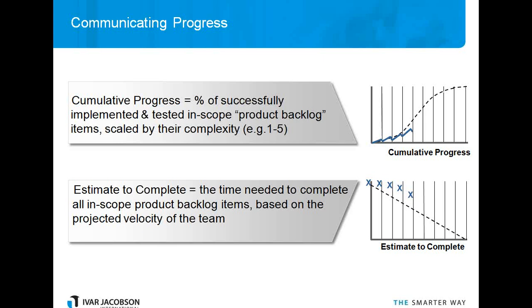The dashed line represents the expected progress on the project. And the curve starts off slowly as you deal with difficult issues, and then ramps up, gets relatively steep, and then toward the end of the project it slows down as you're taking care of the final little bits and errors and defects. So if the progress curve is tracking along with the dashed line approximately, then things are good. If it starts to go slower, as this curve is starting to go, then you potentially have a problem, and so the sponsors would want to know what you're doing to correct that problem.